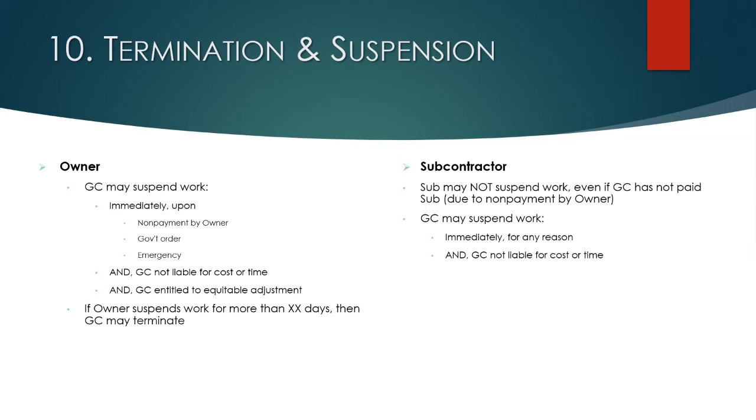With the subcontractor, you don't want the subcontractor to be able to suspend work on its own. You want to be able to force your sub to continue working even if the owner hasn't paid. But you do want to be able to force the sub to suspend work for any reason. And if you do suspend the work, that you're not going to become liable to the subcontractor.